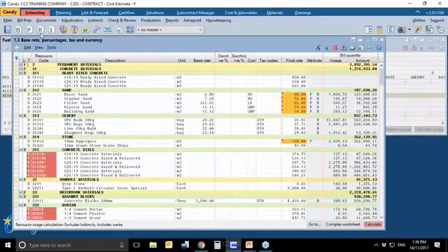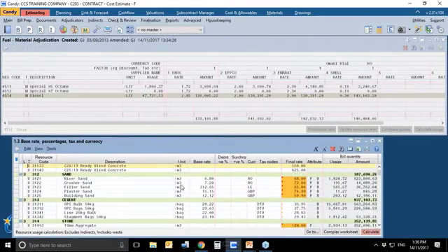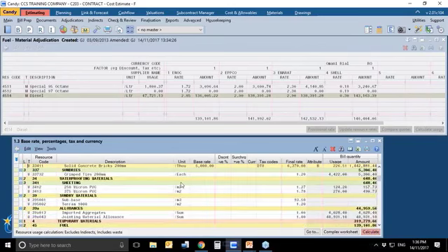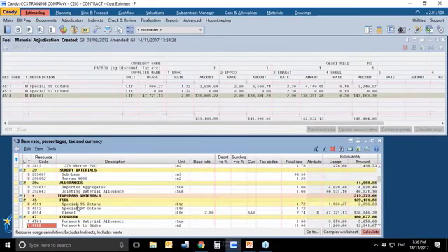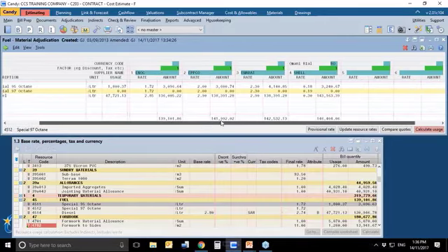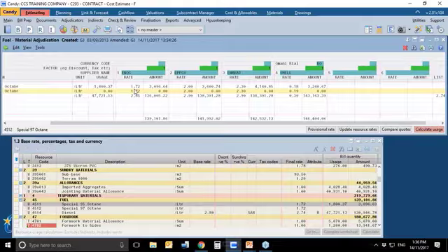Let's open up the resource list and keep it on the bottom half. And there, the 4 series is my fuel at the bottom. Now, for the fuel resources, we've got codes from different suppliers. Enoch has quoted, EPCO has quoted, Emirat, and Shell. Now, you will notice for the first 3 quotations, Enoch, EPCO, Emirat, I don't have a currency code. When you don't have a currency code defined or allocated, or there's no currency mentioned specifically against a rate or an amount, that means it defaults to your base currency, your pricing currency, which is AED.